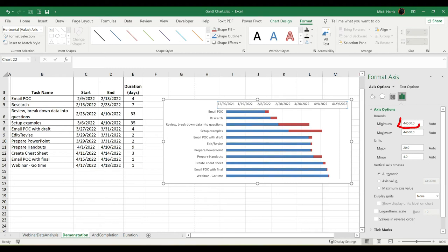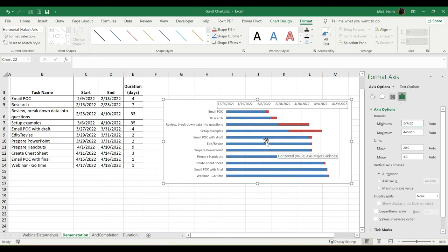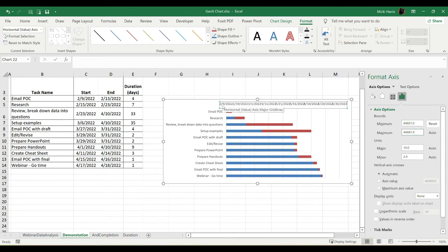Now I want the start date here to match my start date for my project. Notice that what you see here, this is how Excel looks at a date. It's a serial number. But we can actually just type in a date, and Excel will convert that for us. So my project starts on 2/9/22. So I'm just going to put in 2, 9, 2, 2. And that's going to give me my minimum. Now notice that my value axis, my dates up here, also change.